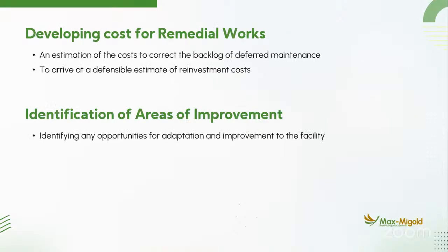Then it also helps you to develop cost for remedial work because of the comprehensive assessment you have done. You can earmark how much it will cost you to do some minor repair work and some major repair work. Then with this, by the time you sum up all these costs together and you're going for management approval, you have defensible data and defensible costs at your disposal to justify the reason why you actually want to spend the money. Then it also helps you to identify areas of improvement, identify any opportunity for adaptation and improvement to the facility. Is very, very key.